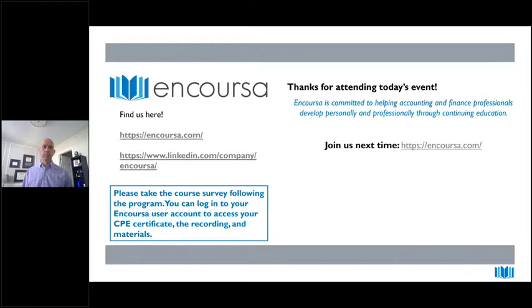Okay, the one last question is, can you apply fee to T&M contracts? So a T&M contract, a time and material contract, is a situation where you have developed the price per labor category. So usually in a time and material contract, the government or the prime is coming to you and they're buying services, right, predefined labor categories, and you have a top level price that's included in there. I have seen situations where the fee or profit that was used to calculate that price has been negotiated. I'm not going to say that's the right answer or the wrong answer, because I've also seen plenty of times where that fee was not negotiated.